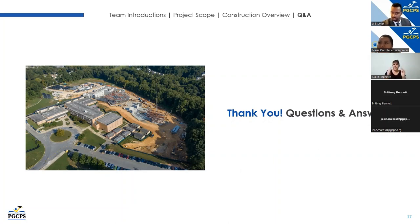So the next question, what continues to cause the date of completion to be pushed back? The date for completion prior to the January 2024 date was August 2023. I think this is multiple impacts, first being just the permit approval process. Initially we were projecting that process to be completed earlier than what was achieved. Unfortunately, we hit some permitting challenges and some additional requirements enforced by our local jurisdiction, in which we had to go back to the drawing board, make some revisions to the design, resubmit, and then ultimately get permit approval before we were able to start the project. In essence, that was the bulk of the delay that pushed it from the August 2023 to the January 2024 date.